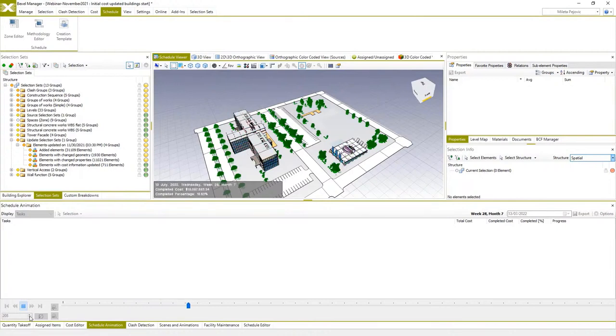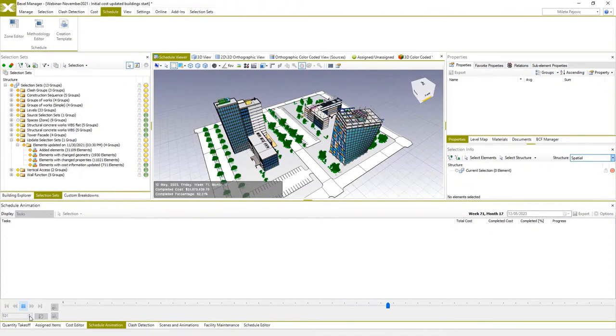I just noted a small issue here with the 4 very big facade panels in the first level of the tower building. Since these panels are very high, they should be assigned to the second or third level, because now it seems that they are going ahead of time. But that's something that can be easily updated. The rest of the schedule looks quite fine. Even all the levels added to our existing office building, and also construction of the second building, look fine.